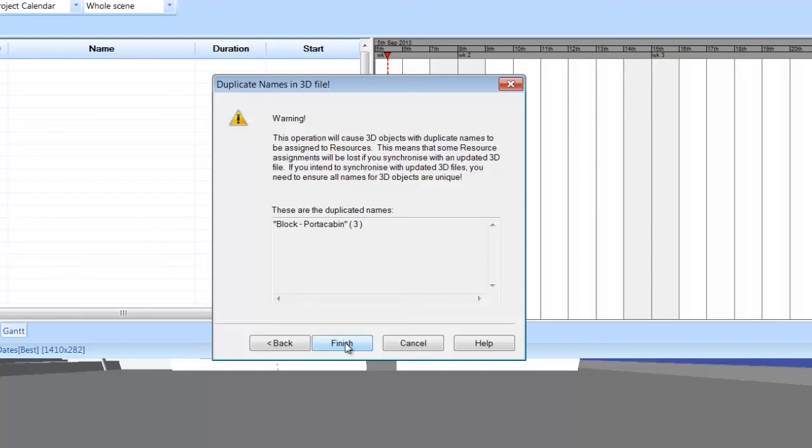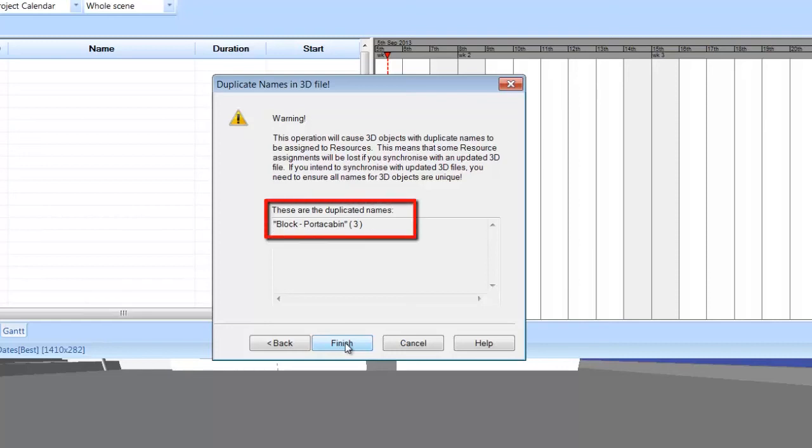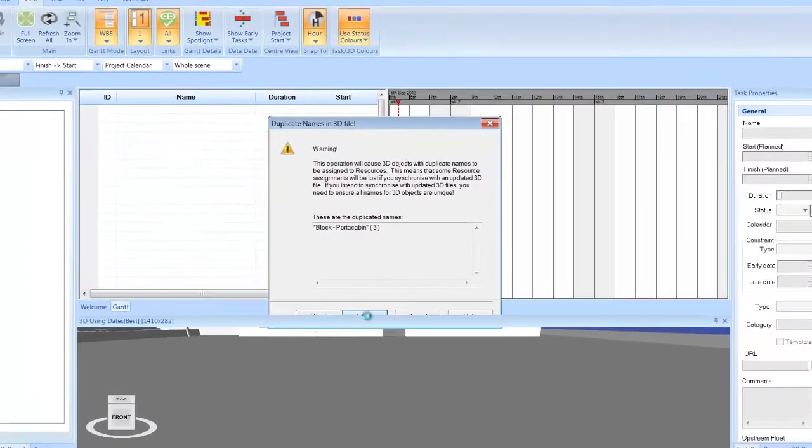The names of the 3D objects will need to be unique if you plan to synchronize with an updated 3D file so that future modification of the structure in your CAD model can be reflected in Synchro. We've received this warning because there are three objects with identical names. However, you can still use these items, so select Finish to continue.